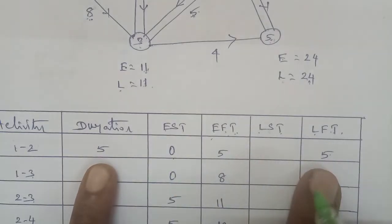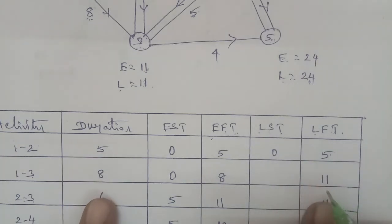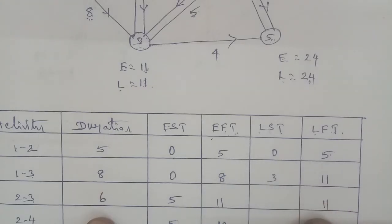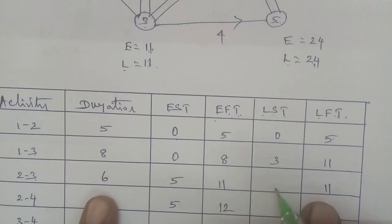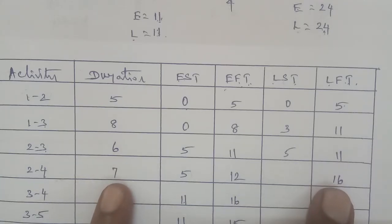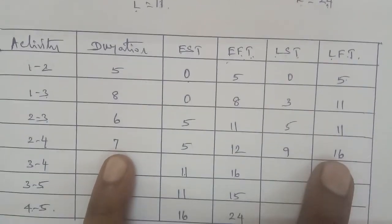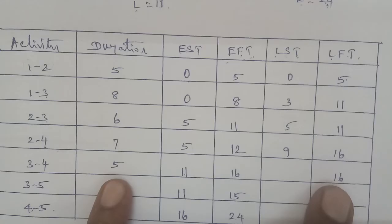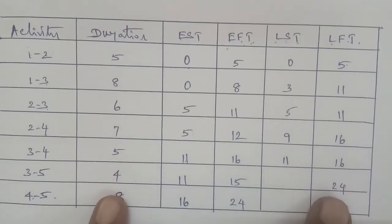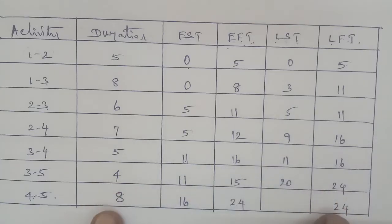Now we calculate the latest start time: LST equals LFT minus duration. For activity 1 to 2: 5 minus 5 equals 0. For activity 1 to 3: 11 minus 8 equals 3. For activity 2 to 3: 11 minus 6 equals 5. For activity 2 to 4: 16 minus 7 equals 9. For activity 3 to 4: 16 minus 5 equals 11. For activity 3 to 5: 24 minus 4 equals 20. For activity 4 to 5: 24 minus 8 equals 16.